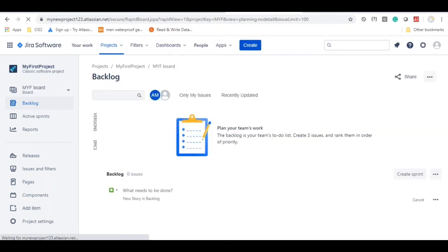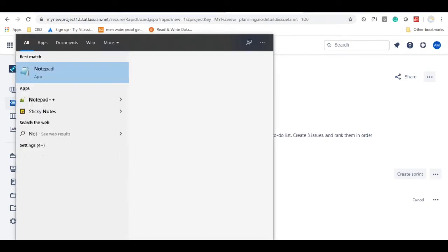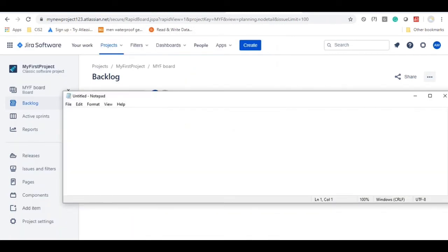Right? So who is going to create the product backlog? The product backlog will be prepared by the product owner by discussing with the end users or clients. So how is he going to create it? Before creating, you should also know some terminology here, like epics and versions. So this is going to be the hierarchy to generate any user story. You will have epics. Under epics, you will have user stories. To develop these user stories, you will have subtasks.